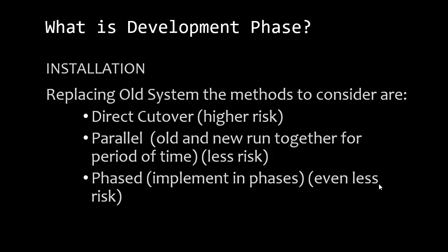Another way of going about it is parallel, meaning you run the old system with the new system at the same time for a period of time.